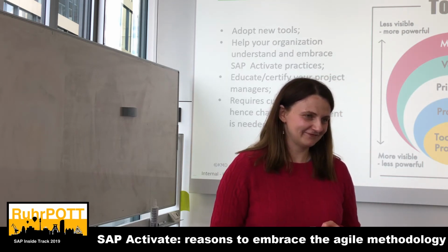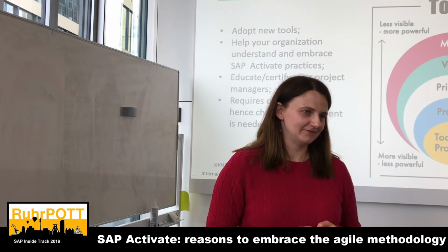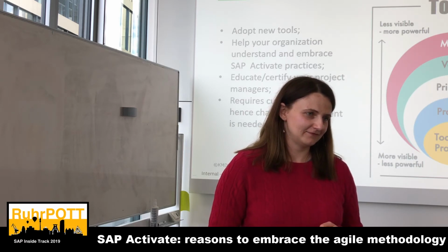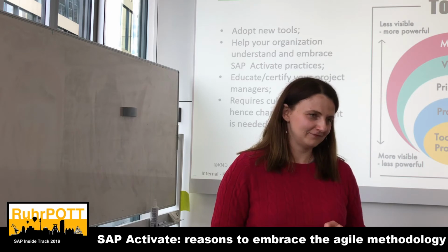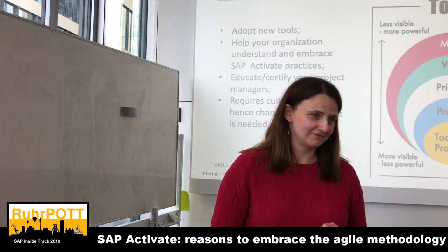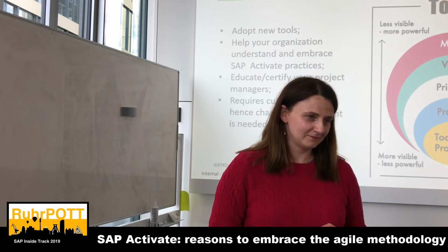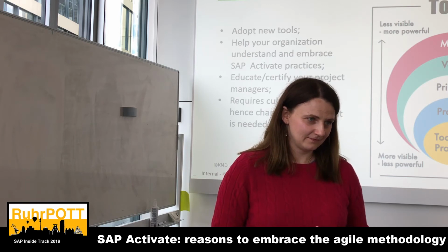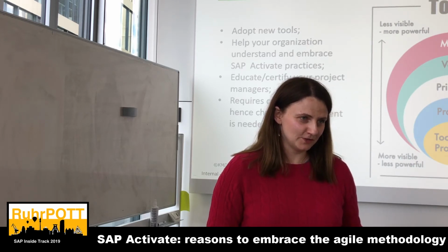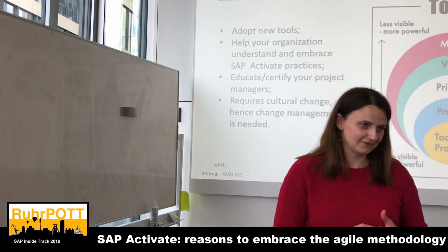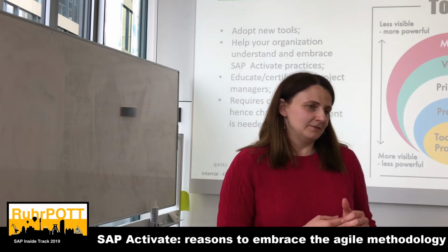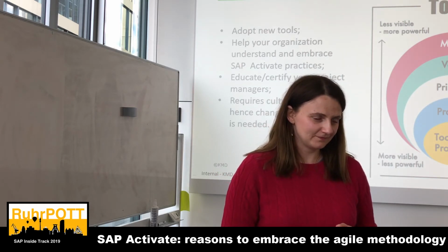If we develop software for a customer, and the client comes to me as a developer and says, "Can you change the color of this button?" Mostly, I cannot say yes, because my boss told me we already spent months to finalize all the requirements and document them. And if the client wants something new, we need to calculate a change request, and something I just need to spend 1 minute on ends up involving 5 or 6 people and taking days.